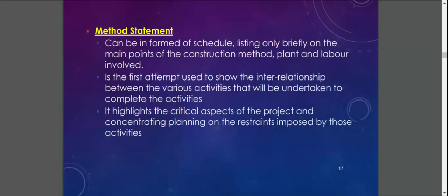The method statement must show all the detailed works that need to be done. Then the document of the method statement must be presented to the consultant. Normally the contractor will have a discussion with the consultant during the technical meeting without the client.